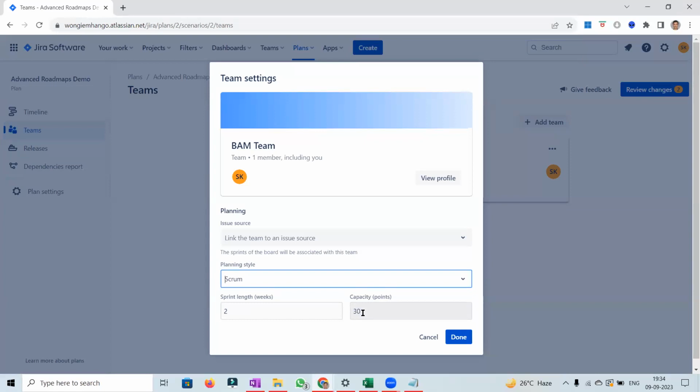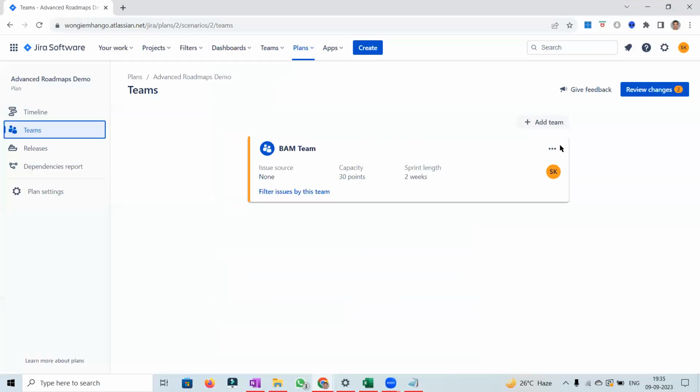How much capacity does the team have? Yes. This is an initial setting we are setting for the overall team level. But sprint wise, we know the capacity might change for various reasons. We can overwrite it when we go to the sprint capacity management screen. So this 30 will be a default standard, which we are assigning at the start of the sprint.